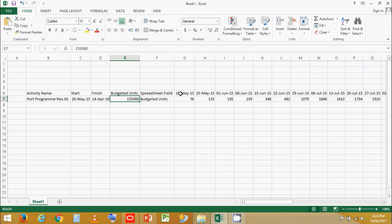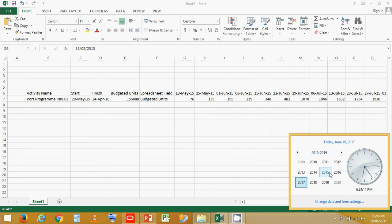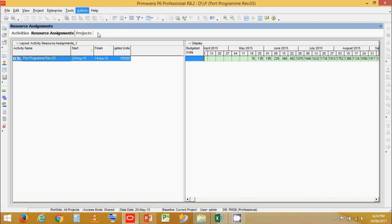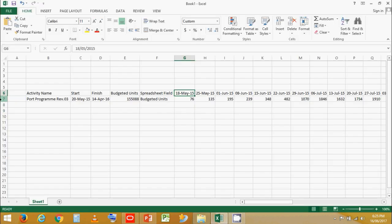What we can see is that there are dates visible — like 18th May, 25th May, 1st June, and so on. Looking at a calendar, 18th May 2015 is a Monday — which is the start day of the week. You can find this setting in Primavera by going to Admin, then Admin Preferences, then General. There you can see the first day of the week is set to Monday. In some Gulf countries it can be Saturday since Friday is the weekend, so you can click and change the first day of the week depending on your country or project.